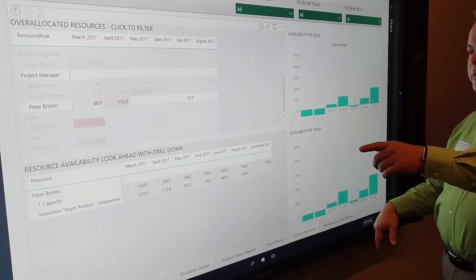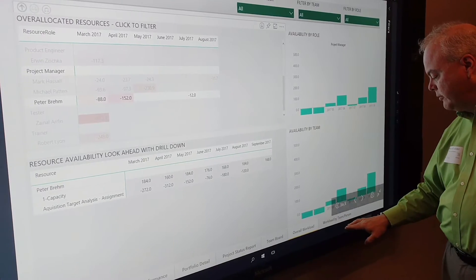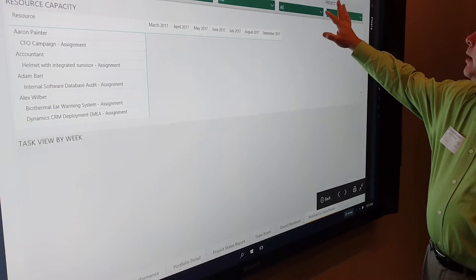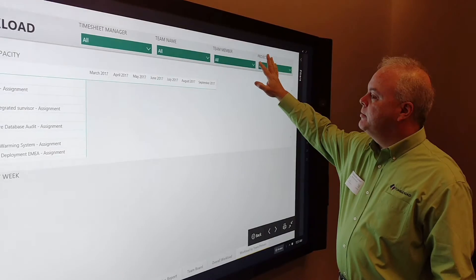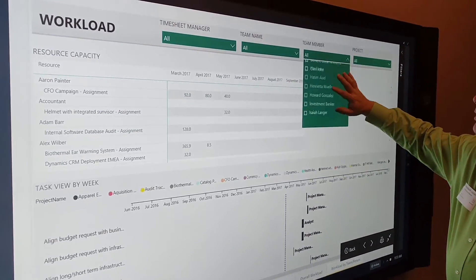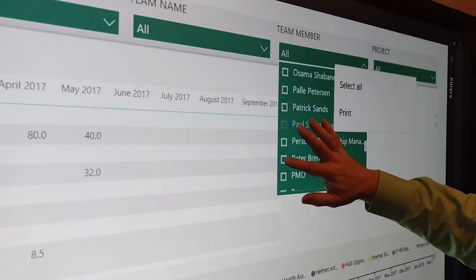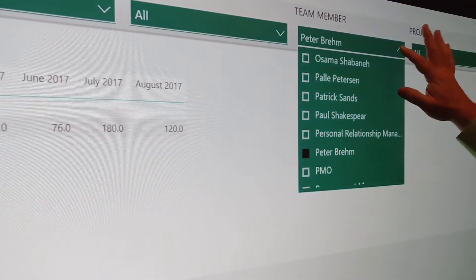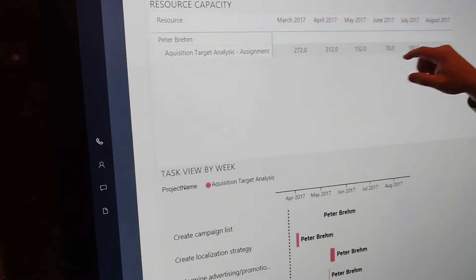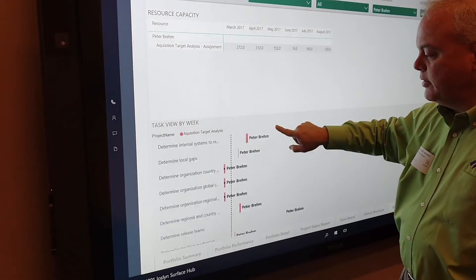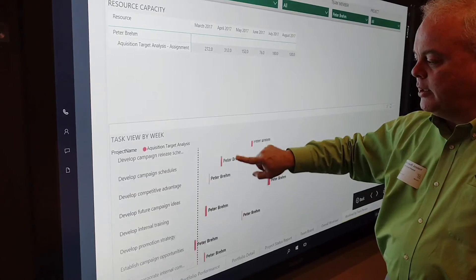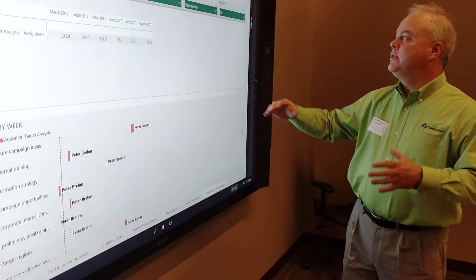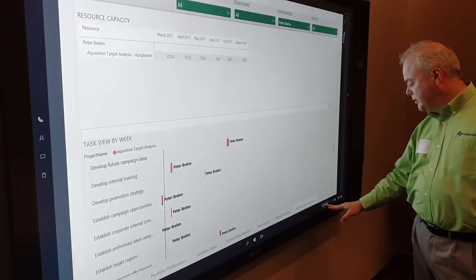If I want to see exactly what Peter's working on, I can go to the Workload My Team. I can filter the team member. In this case, I'm going to scroll down to Peter, and if I select this, you'll see not only what his allocation is by month, but you'll see all the individual tasks he's working on in those projects. It helps me go from high to low very quickly using the data we have in Project Online.